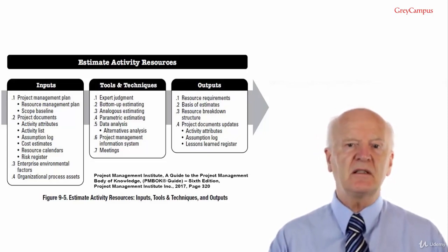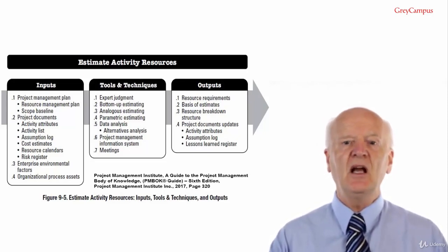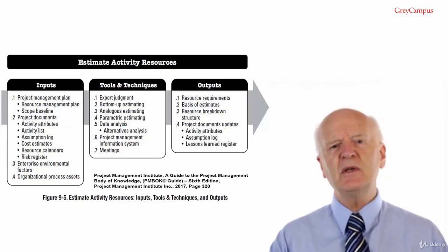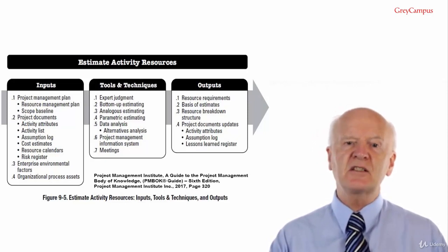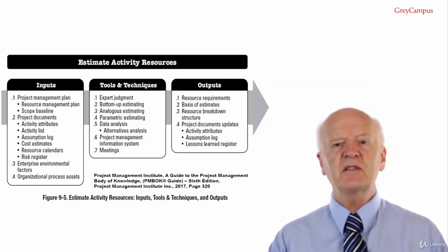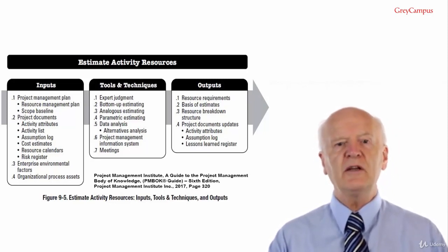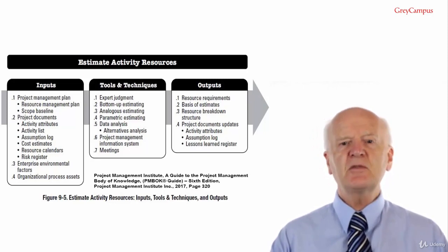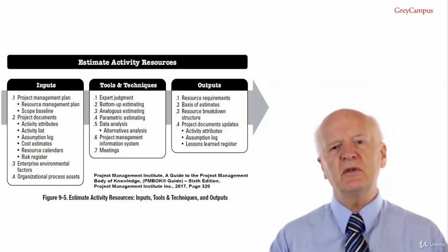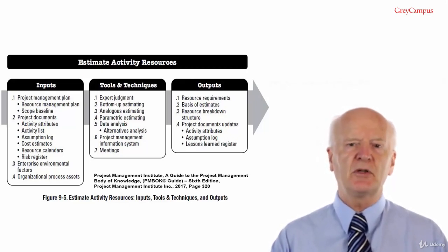Regardless of the level of detail, the supporting documentation should provide a clear and complete understanding of how the resource estimate was derived. As I've said before, you need to be able to fully support any estimates and assumptions that you make in a project. This is the sort of information senior managers will demand if the project goes bad or if it is audited. The biggest mistake is to rely on your memory because you will probably misremember. And even if you do remember correctly, you will need to be able to prove it.